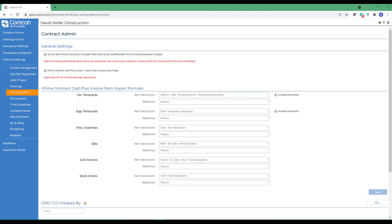The next option allows you to import subcontract invoices into a cost plus prime contract invoice, and whether to include or exclude retainage.